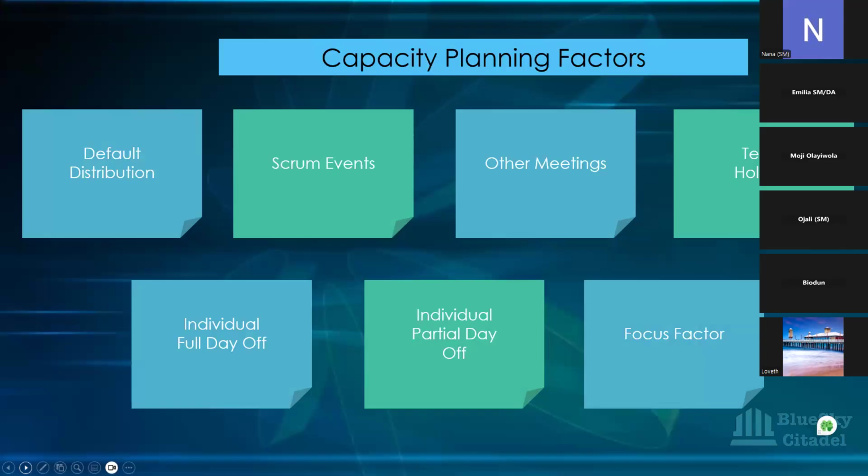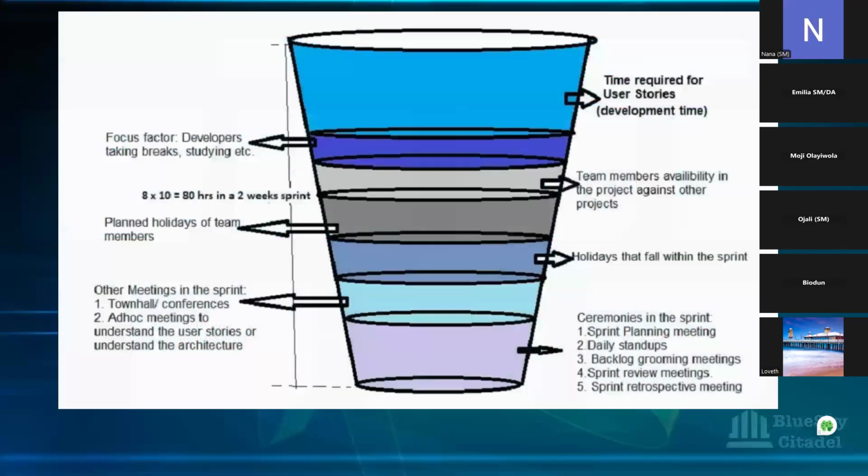And then you're looking at the focus factor. The focus factor is the focus time that the team members actually spend on what they're doing, the time they're actually coding, or the time that the QAs are actually testing, or the time that the BAs are actually analyzing, or the cybersecurity guys are actually carrying out their role, their task. Those are your focus; that's their focus time. And all these are part of the things you need to consider when you're planning your team's capacity.